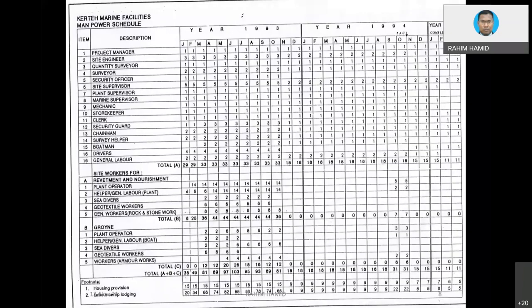Okay, what are we going to get? For instance, the tabulation of manpower, especially. So we can tabulate almost everything. Let's say project manager, site engineer, etc., and look at the number that is inside this column. If, for instance, we are using Microsoft Project, and we input resources in the detailed resource sheet, then automatically we are going to go to the resource usage. We are going to see this kind of tabulation, very similar to what I am showing you. But this diagram is basically from a real project that I was involved in a long time ago.